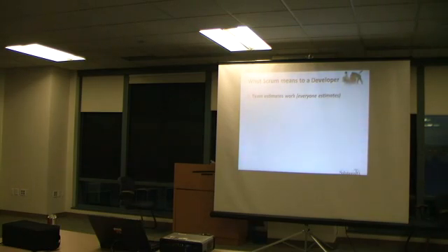Well, the team went off, estimated, and they said, well, we can get about 120 of those done. We can assume it goes around. And they said, well, we can get to right here. Well, that's kind of uncomfortable, because I wished to have this. So you can manage by wishing, and wish to get all that stuff done, and be disappointed, or you can have some confidence, because you've done some delivery, that you're going to hit about here. And now, 5 months ahead of time, I can start having discussions that says, what if I don't get that done? That thing that's beyond that mythical line, what am I going to do about that?